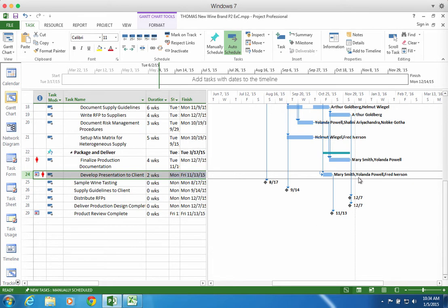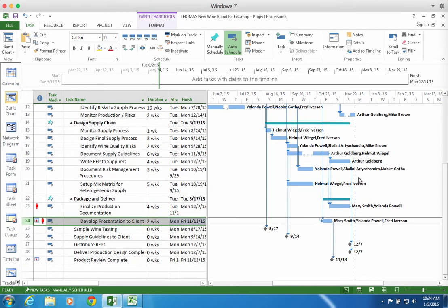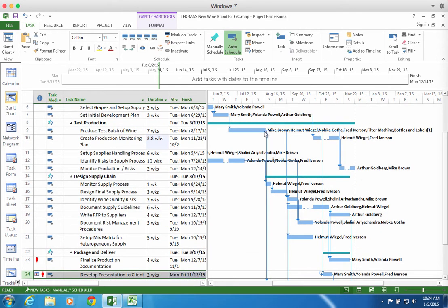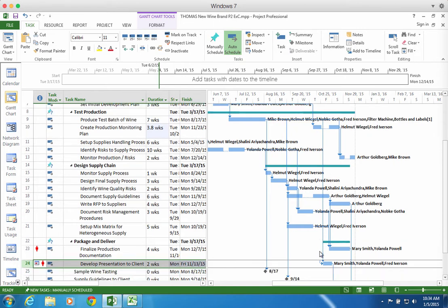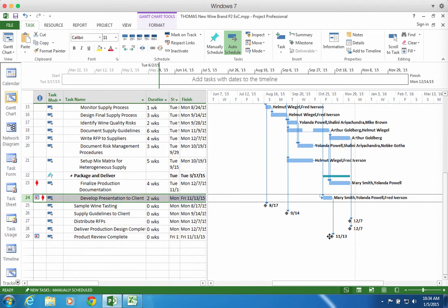Now, it looks like this particular constraint is only associated with this task way back up here. See how I've got these lines dropping out? So I can get done with this milestone. It's apparently not linked to these others. And so I've got to go back and try to get all of these in line to force them back to 11/13. I could pursue that method and probably resolve this and see where all the over allocations are happening.